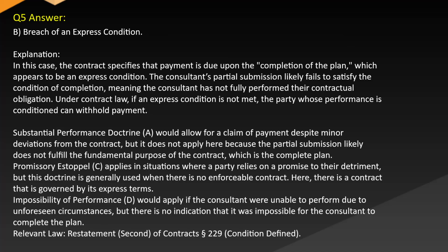Explanation: In this case, the contract specifies that payment is due upon the completion of the plan, which appears to be an express condition. The consultant's partial submission likely fails to satisfy the condition of completion, meaning the consultant has not fully performed their contractual obligation. Under contract law, if an express condition is not met, the party whose performance is conditioned can withhold payment.